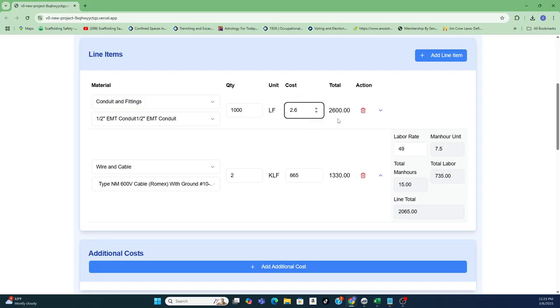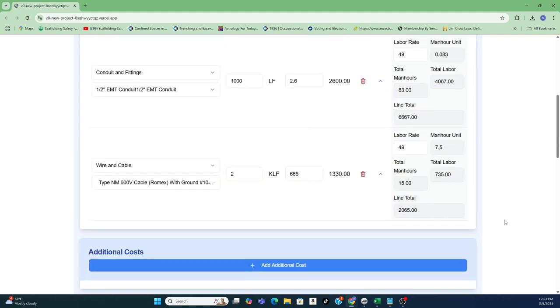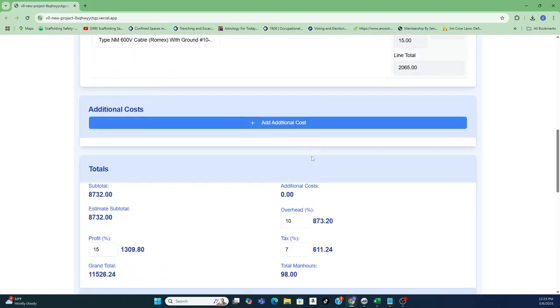What you don't have to input is the man hour unit. You have to input the item you're going to pick, the quantity and the cost. This part isn't chosen for you because those costs are always going to change. So again, what do we have here? We go to the drop down, and now we have everything here, all broken down in great detail. Now if you want to start to create your construction schedule, your WBS, you've got everything you need right in front of you. It's beautiful.